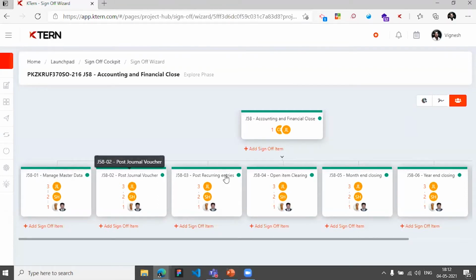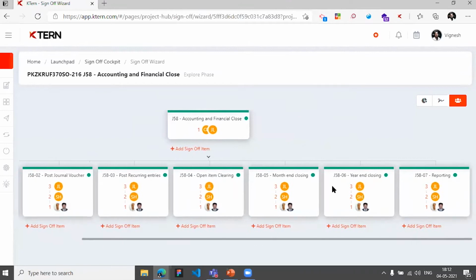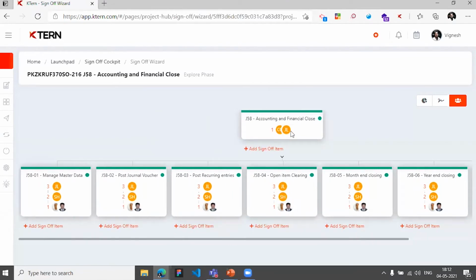Once all of these child items are completed, it triggers a sign off workflow to the project sponsor, who has to say this scope item is approved. So it's about making sure nothing gets missed out amongst the thousands of mails we send, or hundreds of messages we transact.